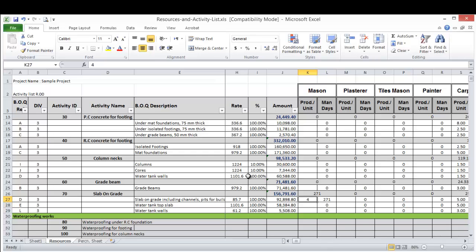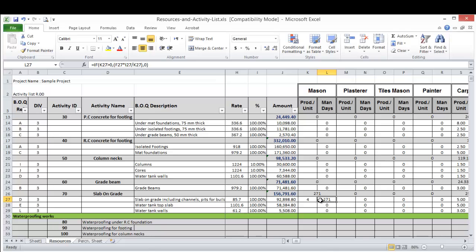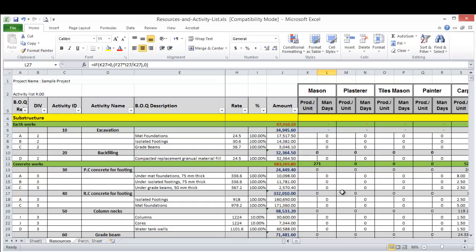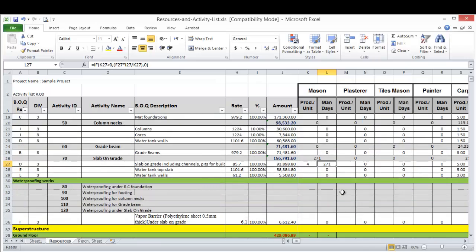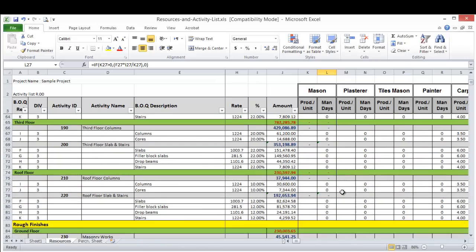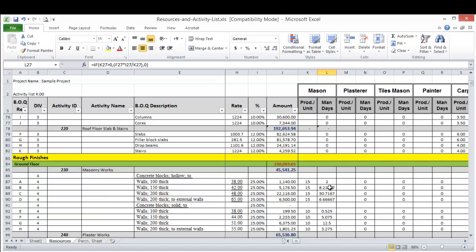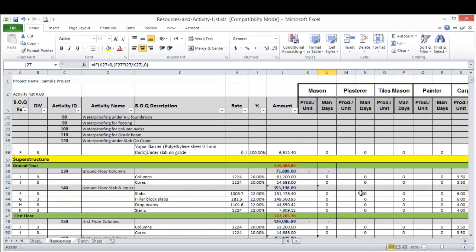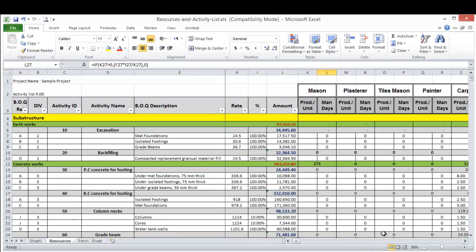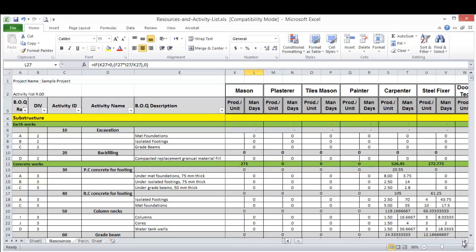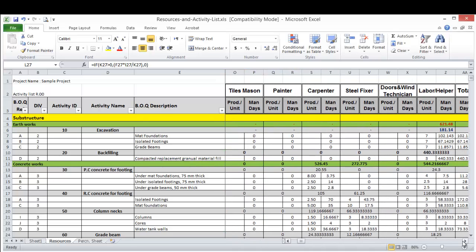And this sheet, you will have to add if there is a mason in this activity, just put the productivity rate here. The sheet will calculate automatically the total mandates. And after you finish populating all the productivity here, then you will come to the activity level.